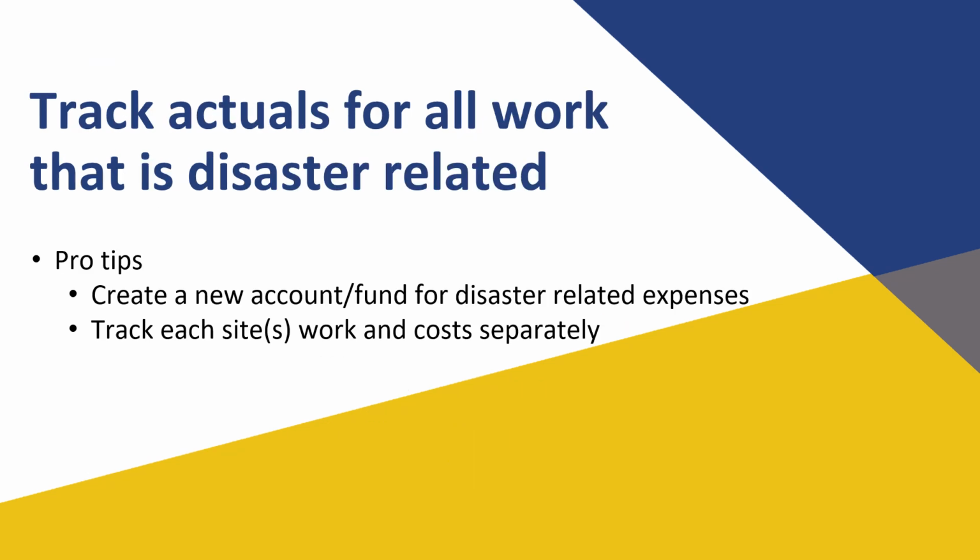Be sure to track actual costs for all disaster-related work. You'll most likely have multiple projects, so be sure to start documenting personnel and equipment time spent on each project in an easily trackable way. One tip: create a new account or fund for disaster-related expenses. Track each site's work and costs separately for easier cost reporting down the road, especially if projects get divided or combined later.